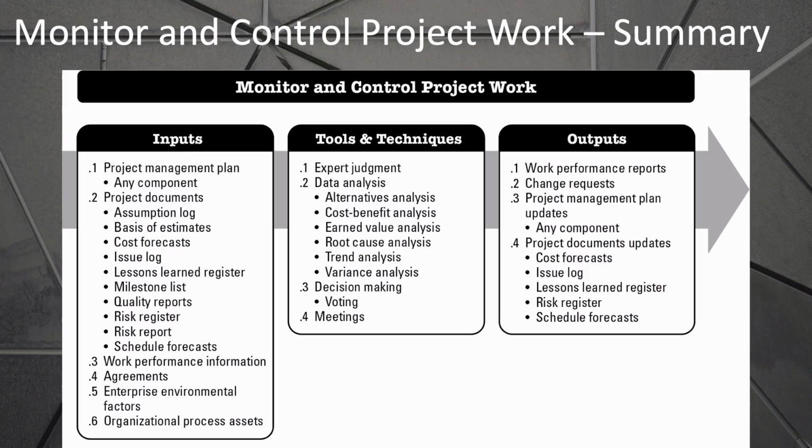Inputs are primarily your work performance information, which comes from all of your different monitoring and controlling processes. And this information will need to be compared to your plan and your baselines and your agreements that you have with other vendors to come up with work performance reports and to see how things are performing and keep an eye on the project work, plus any number of other inputs.